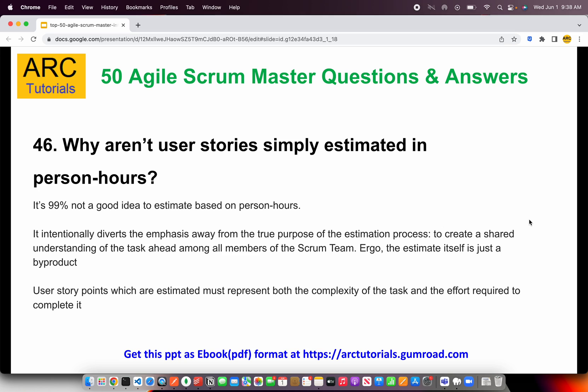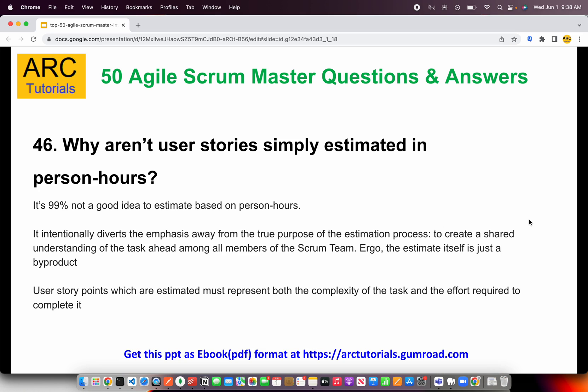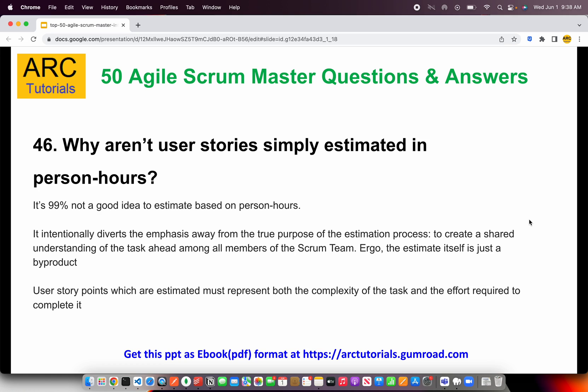Besides, you cannot time-bound stories — they are based on gut feeling of how soon you can complete them. Sometimes stories are too complicated and take a long time; sometimes you don't have the necessary licensing, infrastructure, technical setup, or development setup. You may run into blockers or impediments. Even without blockers, it would become more like micromanagement if you go by person hours, and we don't do that. We go by the complexity of the user stories — how complex a particular story is — and then size it based on small, medium, or large. That's why we don't use person hours estimation.